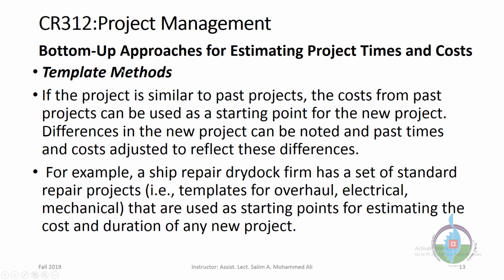Let's jump to the second method, which is bottom-up approach. We also have some methods specific for bottom-up approach. The first method is the template method. If a project is similar to past projects, the cost from the past project can be used as a starting point for the new project. Differences in the new project can be noted and past times and costs adjusted to reflect these differences. This is using the template method.